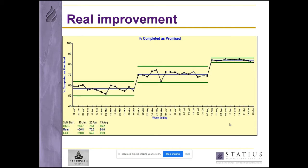So how might we apply these lessons? This example shows where we worked with an on-site construction team to investigate and improve the percentage of jobs completed as promised. We can see for the first part of the year the job closeout average is just 55%. After taking action and making various changes to the process, the average increased firstly to 70%, and then after a second round of improvement to over 80%. This is a significant improvement in efficiency, a dramatic reduction in on-site muddle — it increased capacity and filtered straight through to the bottom line.